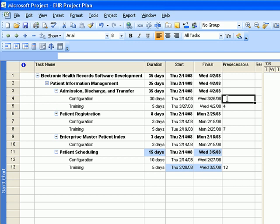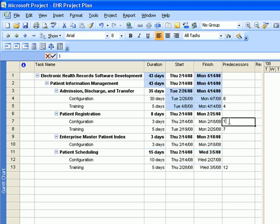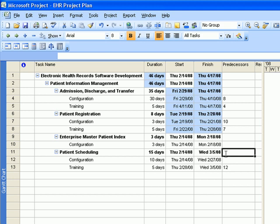Enter 8, then for Patient Registration, the predecessor is Enterprise Master Patient Index with task ID number 10 — enter 10. Enterprise Master Patient Index has no predecessor, so leave that alone. For Patient Scheduling, the predecessor is Patient Registration training, task ID number 8 — enter 8 in that box.